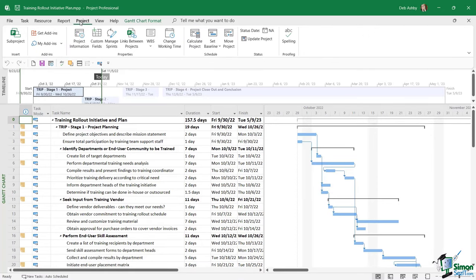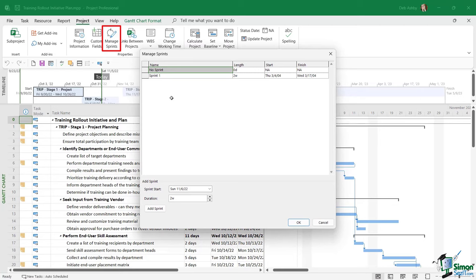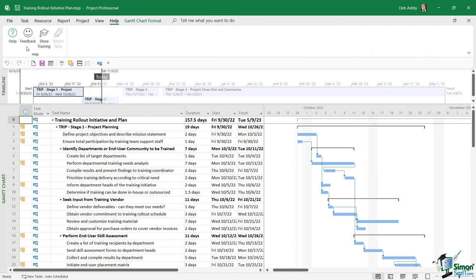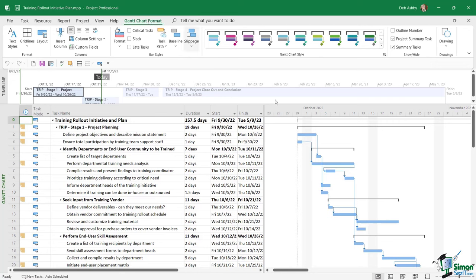On the Project tab, in the Properties group, we now have the ability to manage sprints — changing sprint names, adding sprints, and defining start, finish, and length. On the View tab there's a new 'Task Board View' to view tasks based on different buckets. On the Help tab, the format ribbon for Gantt Chart was previously just called 'Format' in Project 2019 — it's been renamed to 'Gantt Chart Format.'